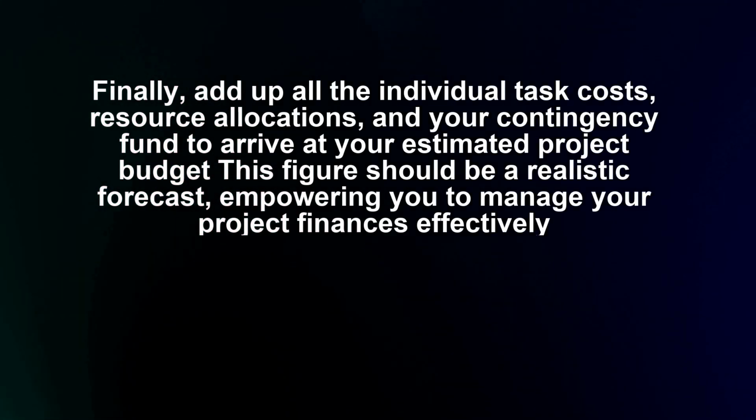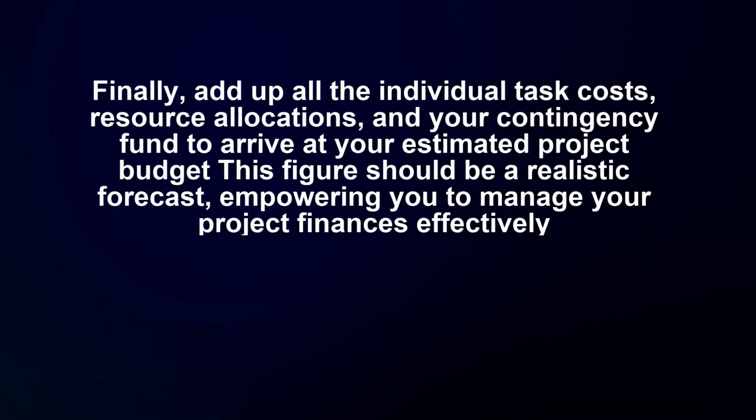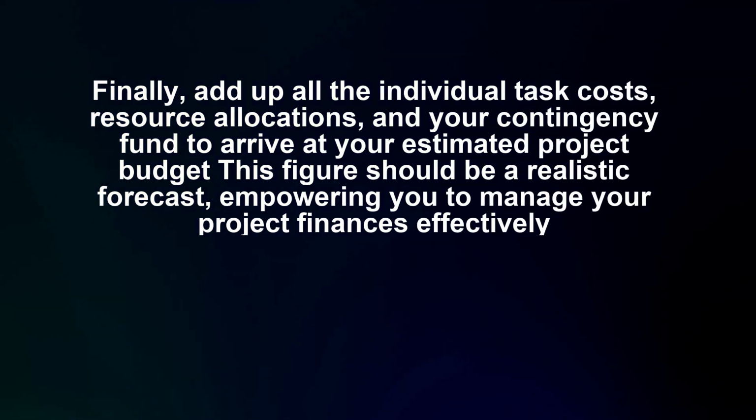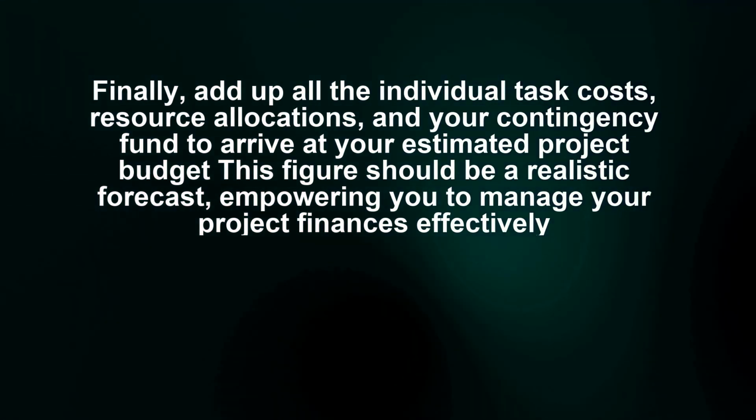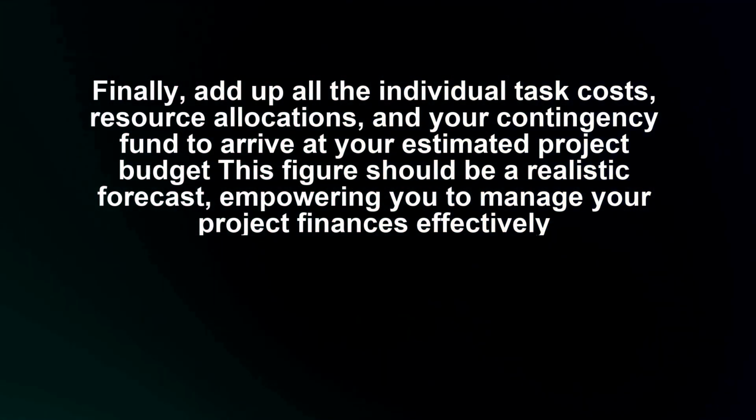Finally, add up all the individual task costs, resource allocations, and your contingency fund to arrive at your estimated project budget. This figure should be a realistic forecast, empowering you to manage your project finances effectively.